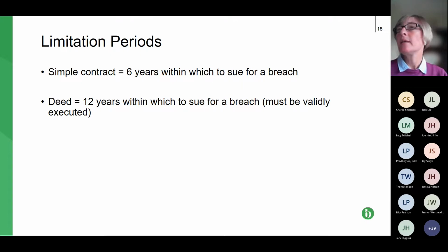You can tell a deed because it states somewhere in the document that it's executed as a deed. It needs to say that it's a deed, whereas a simple contract will just say that it's signed.